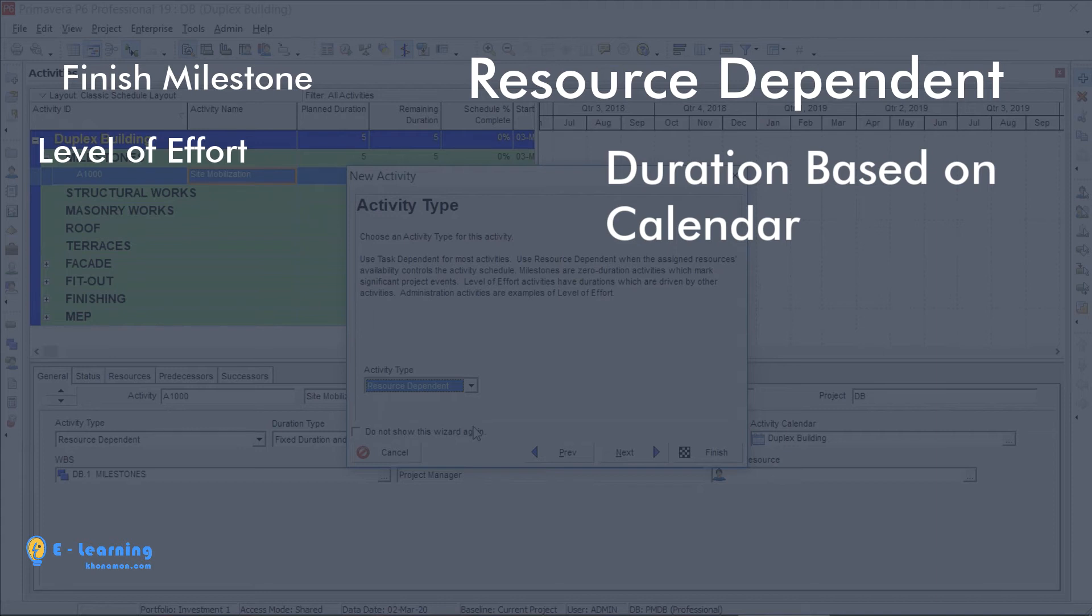In other words, if the resource has some non-working days in its calendar, the activity is non-working during that period.